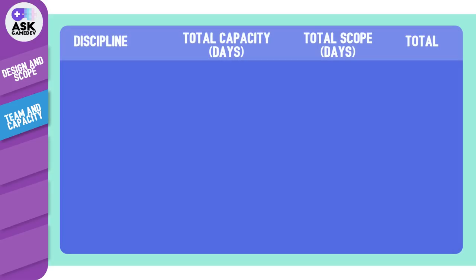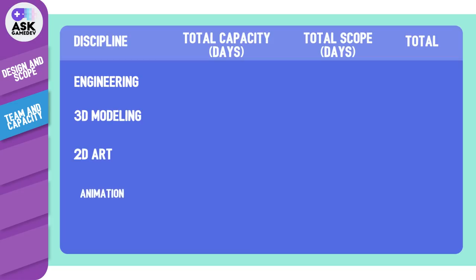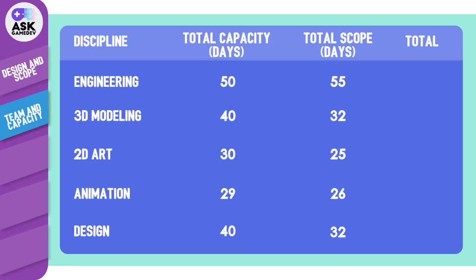Typical discipline categories might include engineering, 3D modeling, 2D art, animation, or design. You will then take the anticipated scope and calculate it as a percentage of the capacity. You'll want to see your scope at something less than 100%, given that your staff will inevitably miss some development time due to unforeseen commitments or sick time. If your scope is greater than 100% of capacity, then you'll either have to reduce scope or add more resources to your team.